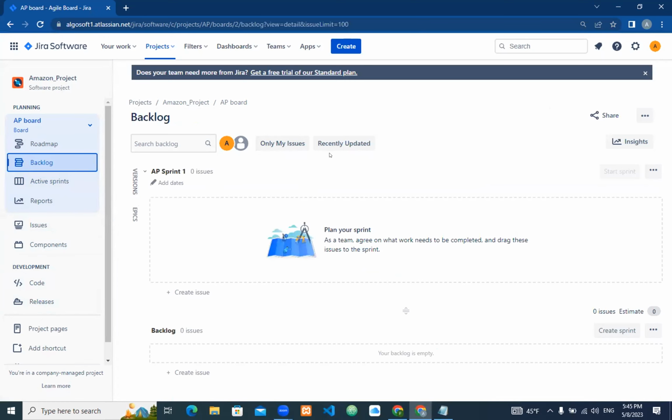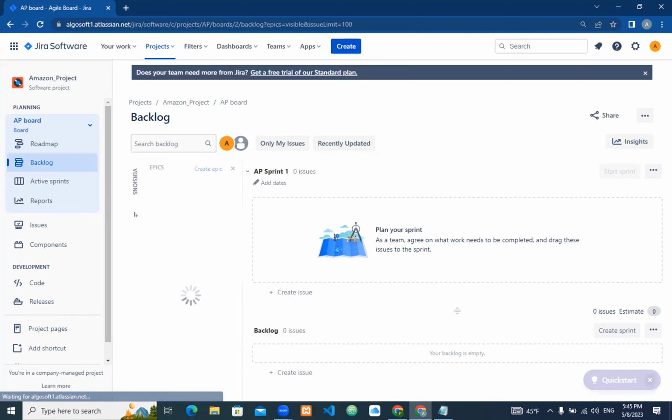In this interface, you can see that we don't have an epic or version, but if you look in a vertical mode, we have epics. Whenever you click on epics, the board of epics will come. Now, your duty is, first of all, to create the epic. What is an epic? Overall, you are defining the problem statement, the requirement of the customer in a general view. I'll click on the create epic button. Here we have the create epic, guys. This is a link, not a button.